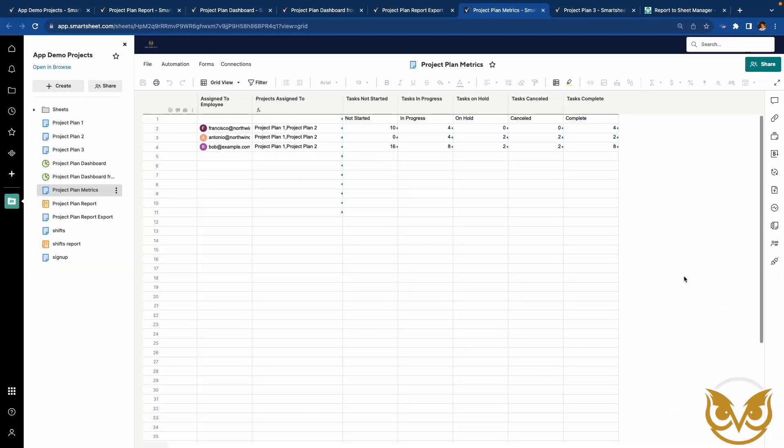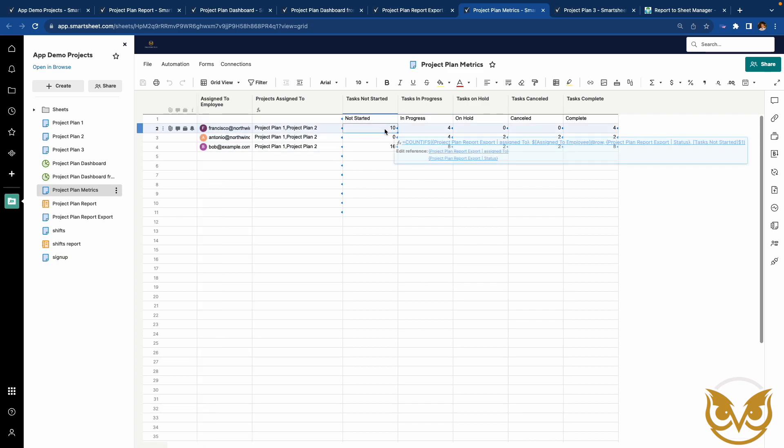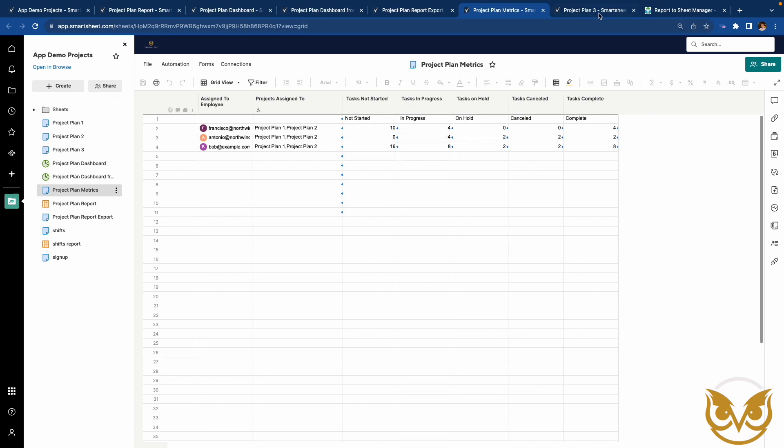Next is a metric sheet. Note that it is bad practice to use a contact column in a Smartsheet lookup formula, but I made this example quickly. This sheet is calculating the number of tasks in a given status assigned to each employee across the portfolio of projects.